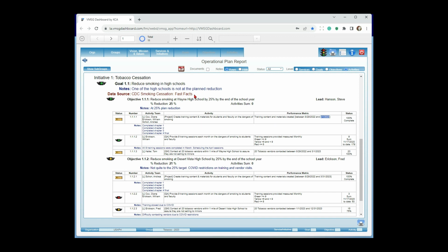And here's where you might use that. So maybe I want to go say, what was I supposed to have got completed in August? We're getting to the end of August. You can generate that. And if any activities show up that aren't completed in August, you can go and look at it and say, oh, I forgot to finish that one up. Or I can look and say, what am I supposed to be doing in September? So I can go look at the ending date of the activity that's supposed to be ending in September, meaning I'm supposed to have completed it in September. So it just allows you to generate a report that's filtered by date. And the date is the ending date of the activity.